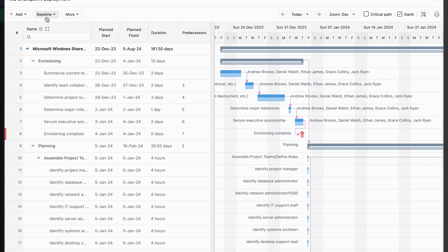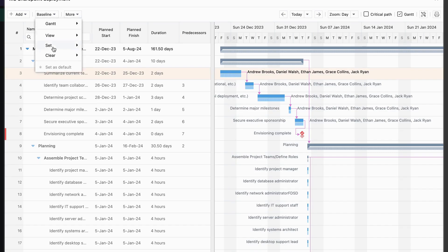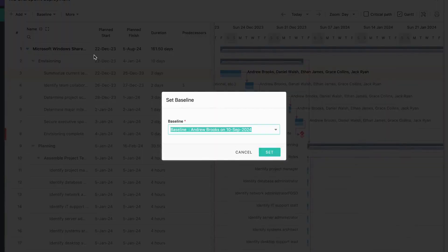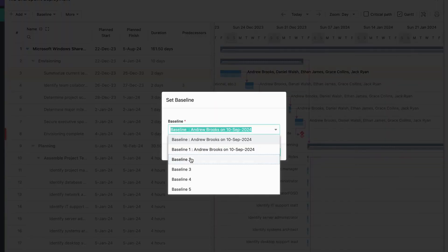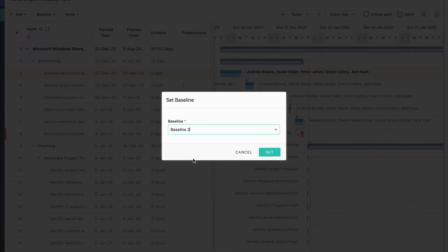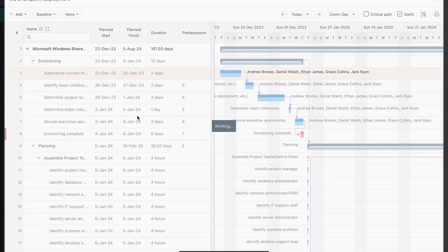Now, let's say you want to baseline a particular task. Here's how to do it. Select the task, then click on the Baseline option and choose Set. Next, click on Selected Task, pick a new baseline slot and save it.